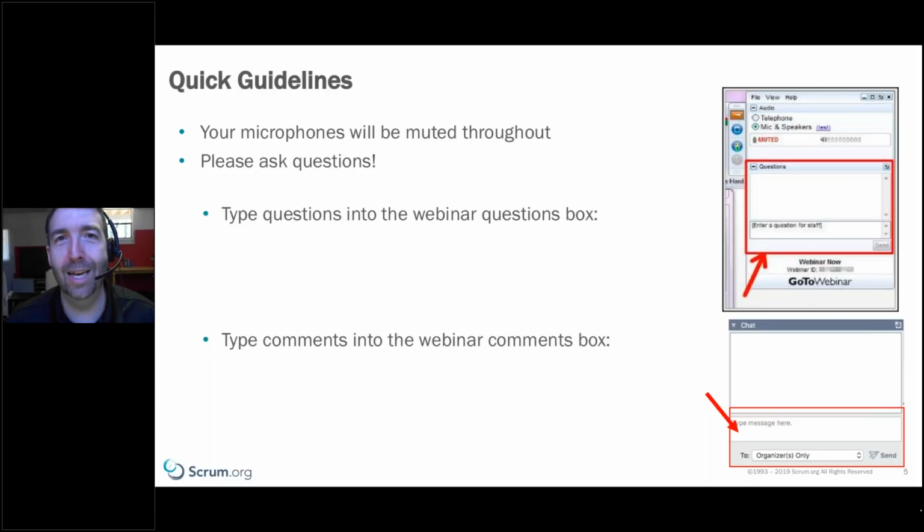you want to do something that will stick. And so don't conceive everything that could possibly be included and go from having nothing in your definition of done to every single thing possible in the definition of done that can never be met. So have a definition of done that you can reach each sprint, and then begin to add the most important things to that. If you're in a Scrum Master role, then this is part of your responsibility to help the team identify the next most important thing that should be added to that, and it should grow over time.